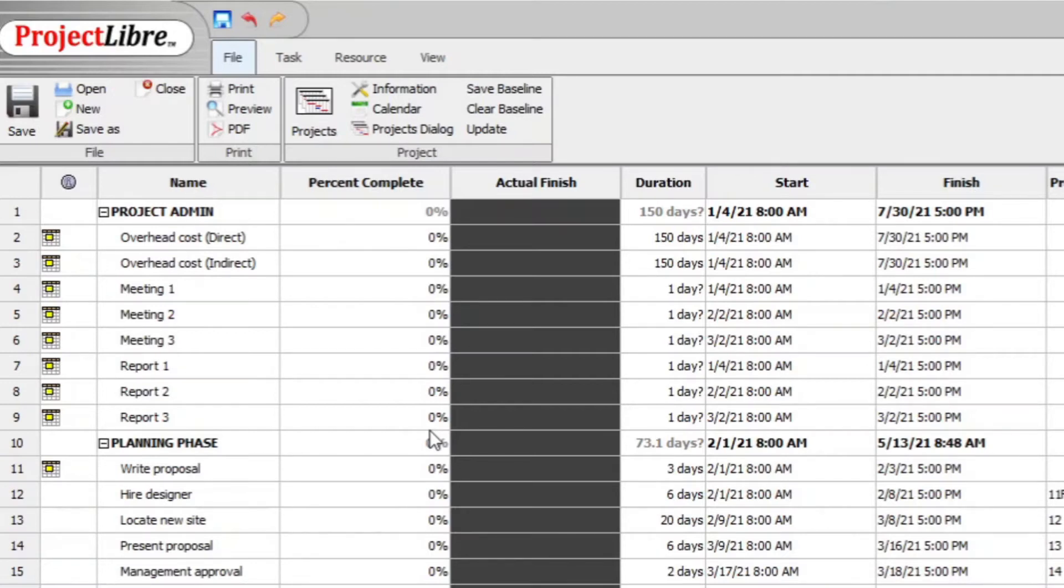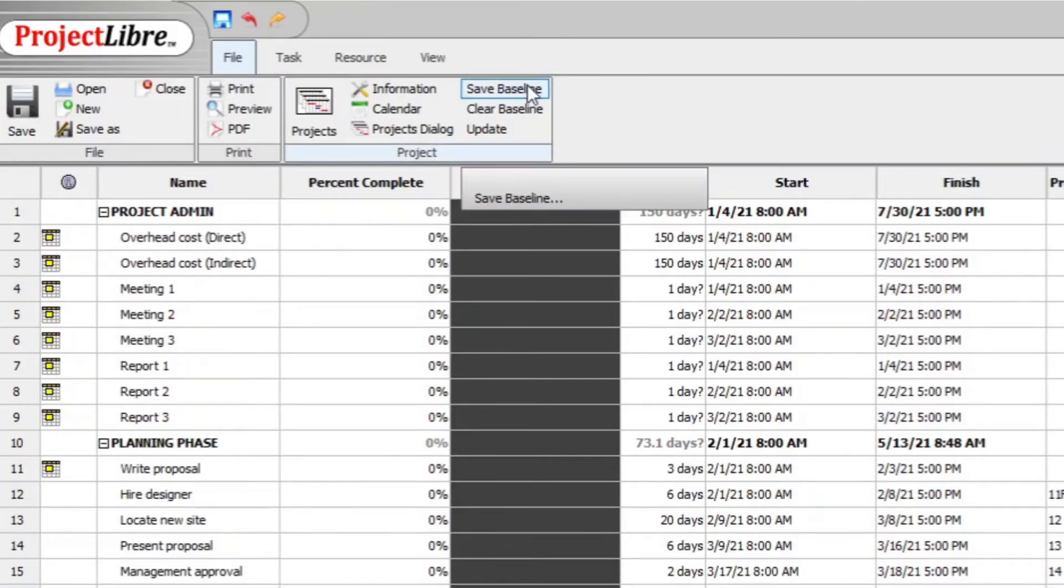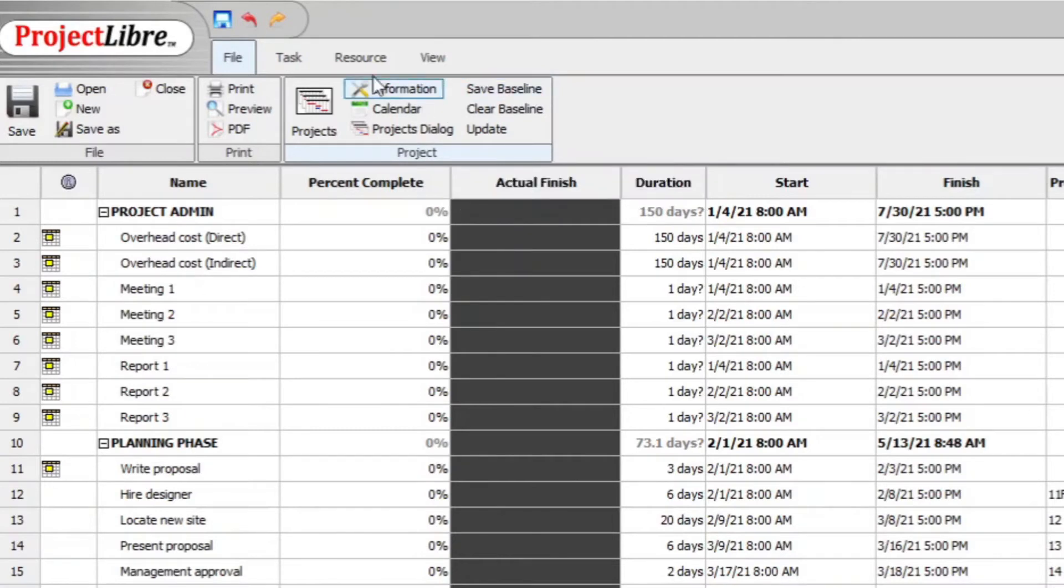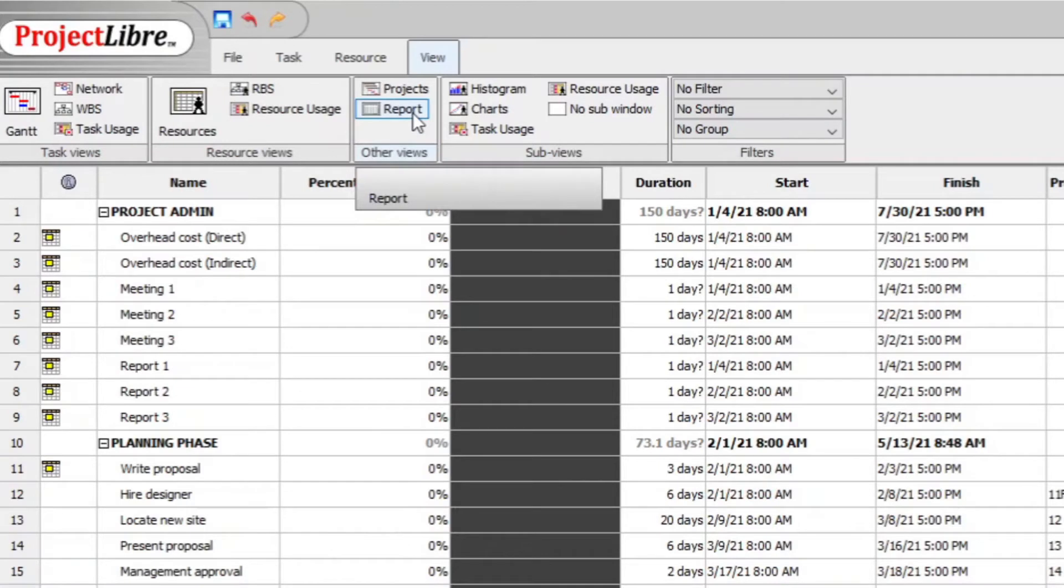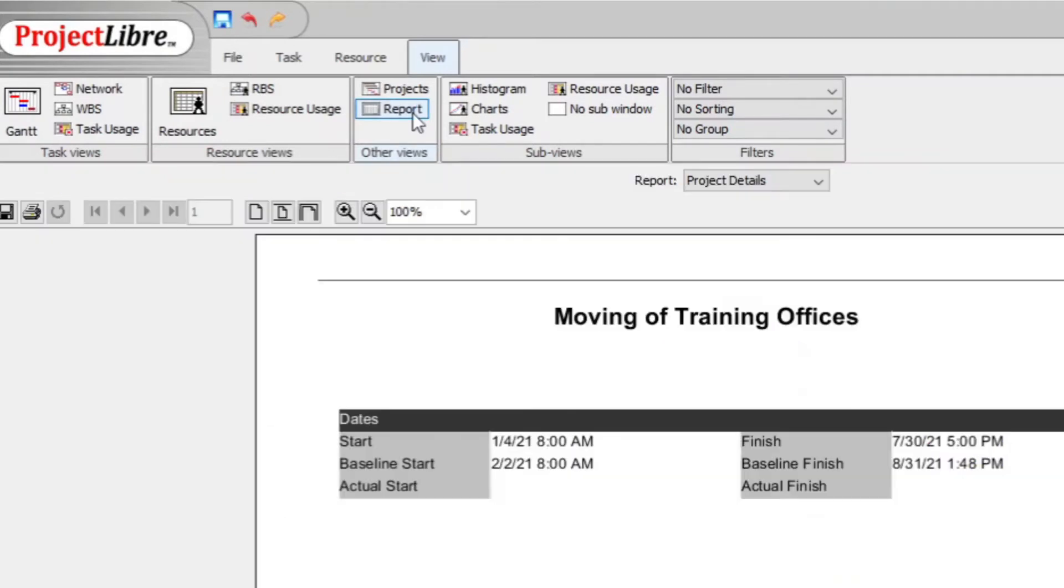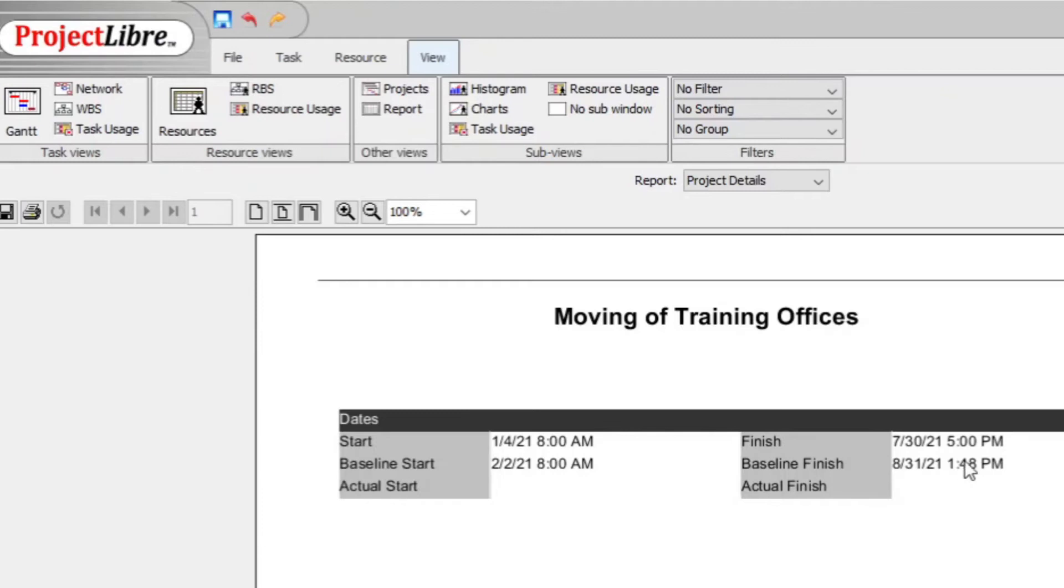And what you do now further is you reinsert the, since you do have a baseline and you can check if you have a baseline by going to view and then go to report. And on the reports, you will see project details and on the baseline, baseline start, baseline finish.